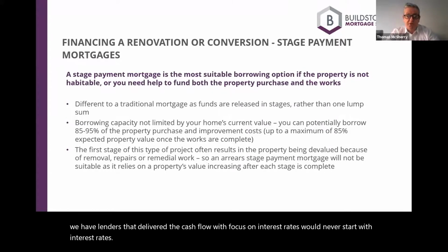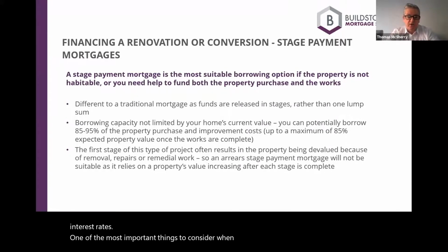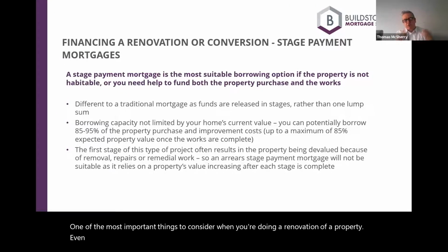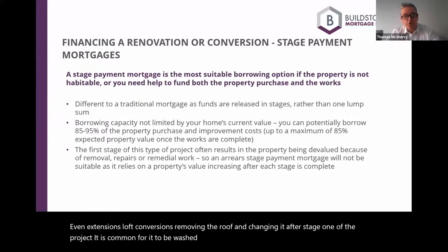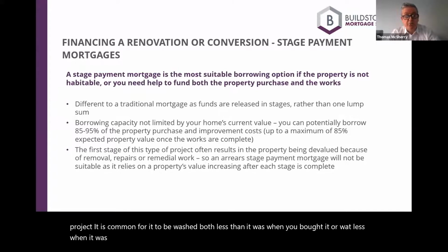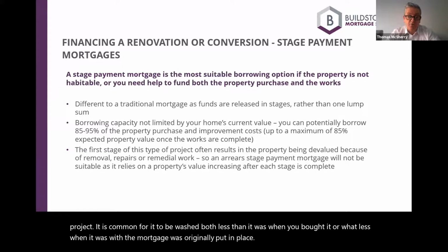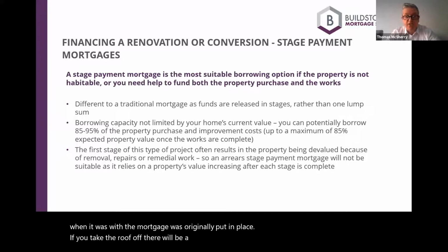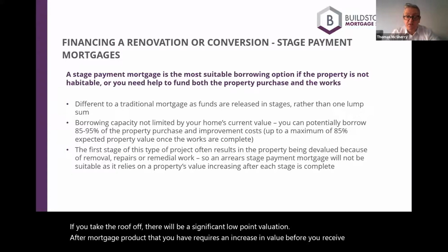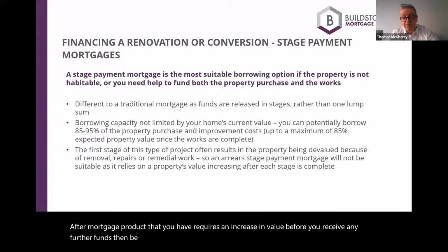One of the most important things to consider when you're doing a renovation of a property, and even extensions, loft conversions, removing the roof and changing it, after stage one of the project, it is common for it to be worth less than it was when you bought it, or worth less than it was when the mortgage was originally put in place. If you take the roof off, there will be a significant low point valuation. If your mortgage product requires an increase in value before you receive any further funds, then be aware that could be significantly problematic.